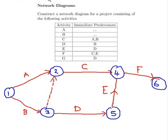And lastly, we have activity G. That just depends on D. And that can go into 6 as well. There are no activities that are dependent on F or G. That is the end of it. So 6 is the last node. That ends our presentation. Thank you.